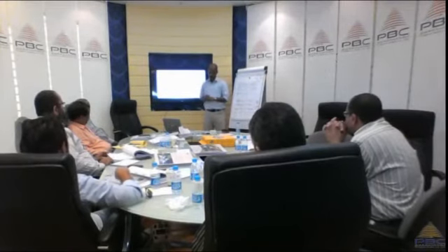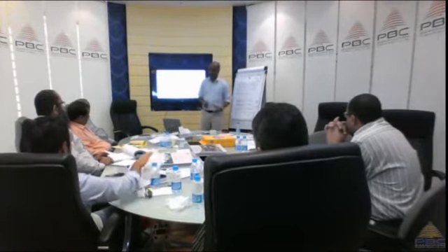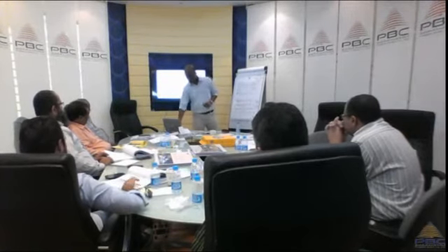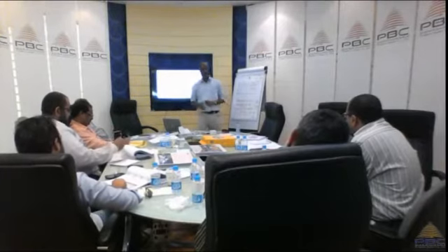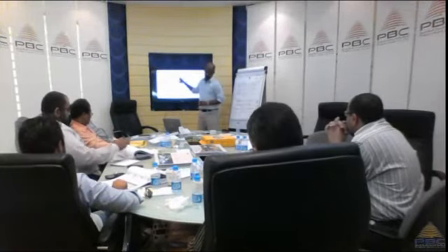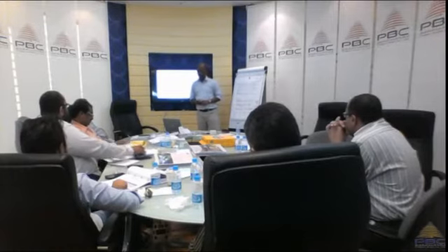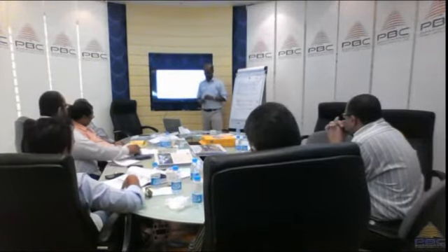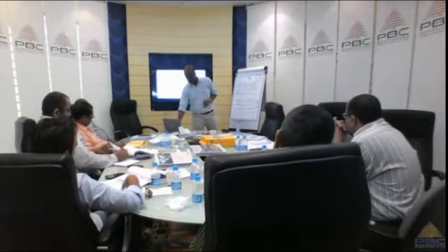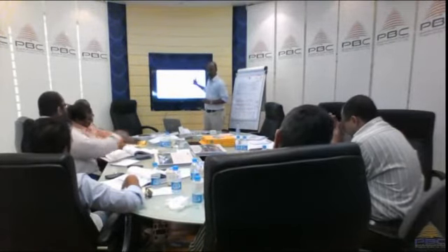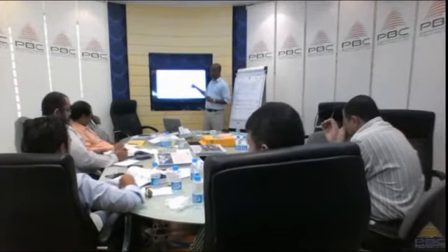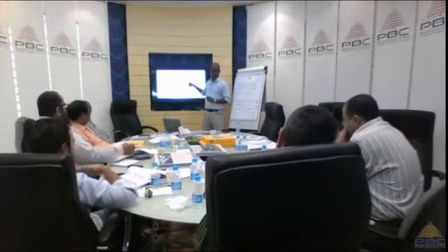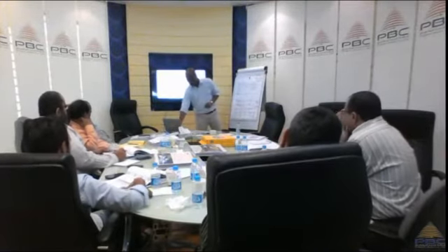So a new project manager comes on board. The new project manager is asked to revise the BAC and come up with an EAC. EAC stands for estimate at completion, because we don't have confidence in this BAC. We feel there's a huge deviation. So EAC is a revised BAC. Now, to calculate a new EAC, we have 3 ways of calculating it.